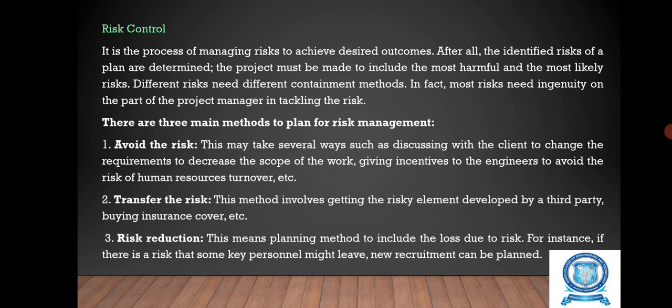Avoid the risk. This may take several ways, such as discussing with the client to change the requirements to decrease the scope of the work, giving incentives to the engineers to avoid the risk of human resources turnover, etc. Transfer the risk. This method involves getting the risky elements developed by a third party, buying insurance cover, etc. Risk reduction means planning to include the loss due to risk. For instance, if there is a risk that some key personnel might leave, new recruitment can be planned.